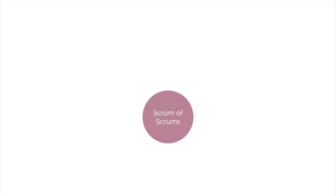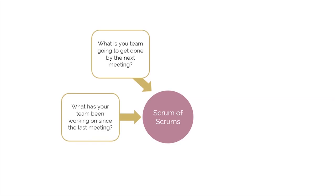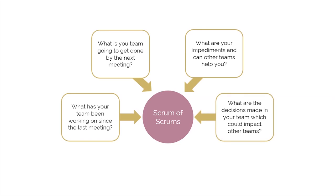Here we can see what questions are addressed in the Scrum of Scrums: What has your team been working on since the last meeting? What is your team going to get done by the next meeting? What are your impediments and can other teams help you? What are the decisions made in your team which could impact other teams?